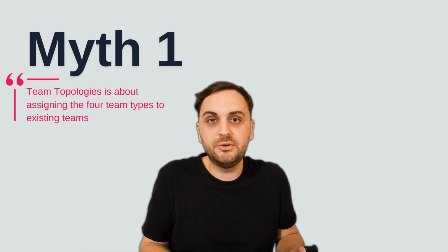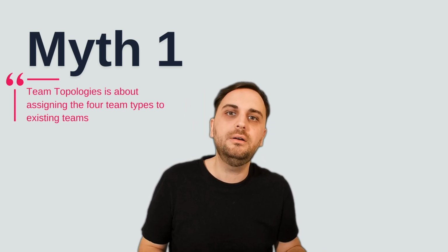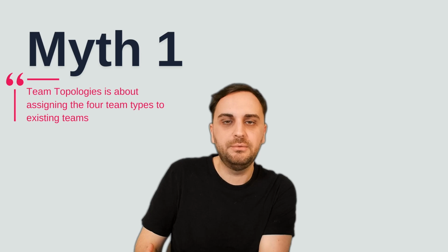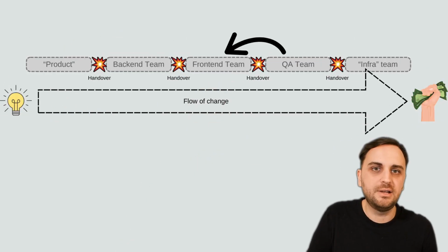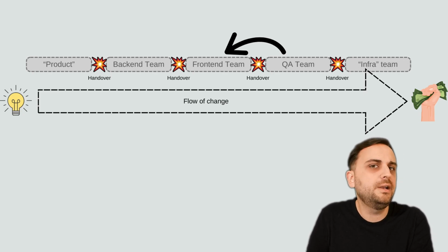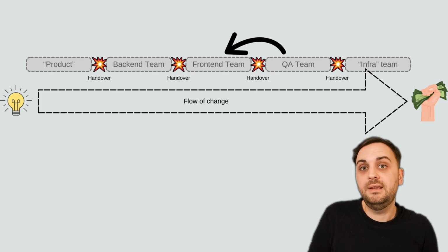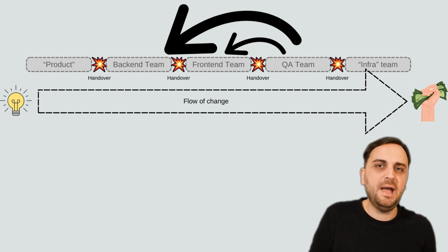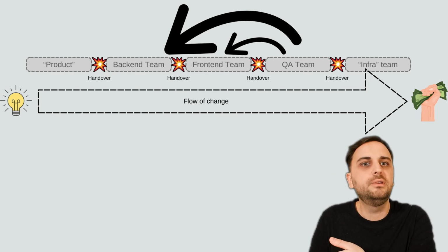The reality is much worse because always something will go wrong. And when something goes wrong, you get this back pressure ripping through your whole company back up the handover stack. So if QA discovers, oh, something's wrong with my software, they're going to give it back to the front end team, for instance, say, oh, there's something wrong with this, please fix it. Or it could be that they say, oh, actually, we know it's in the back end because we just have experience for it. Or they create a duplicate ticket and they give it over to the back end team.